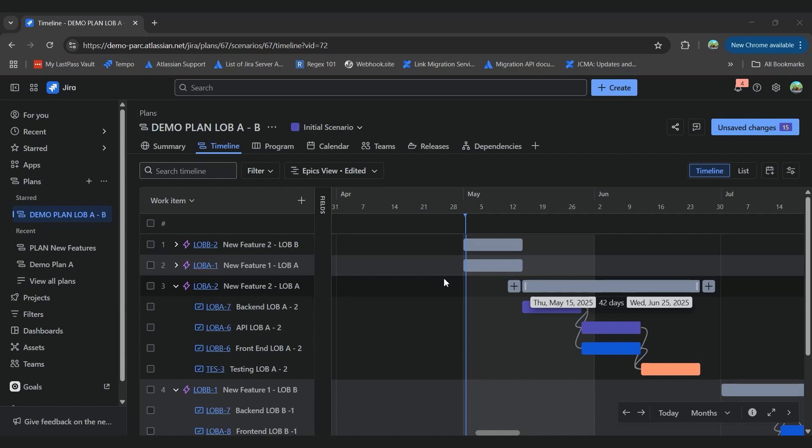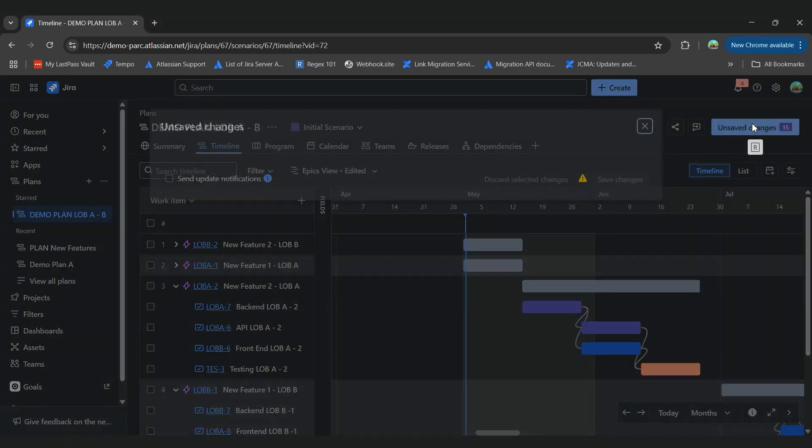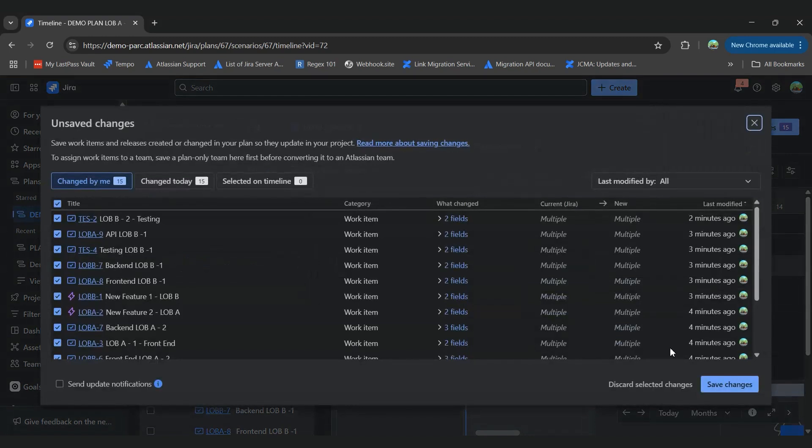Your plan is a sandbox environment, meaning that any changes you make won't be committed back to your JIRA work items until you choose to do so. That's why we have the unsaved changes button here, and until we click on save changes, we won't apply those changes to our JIRA work items.